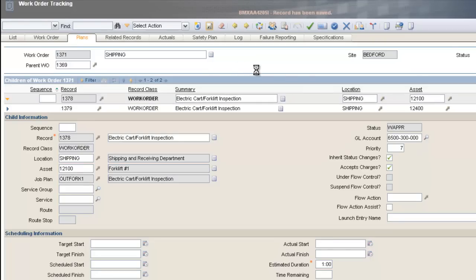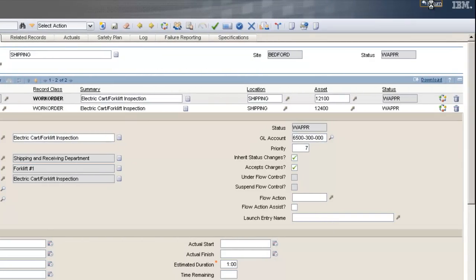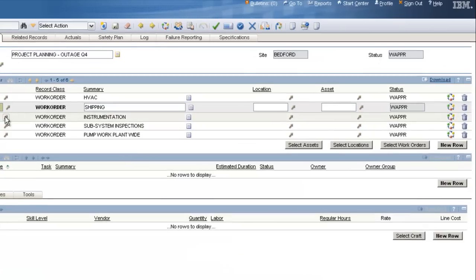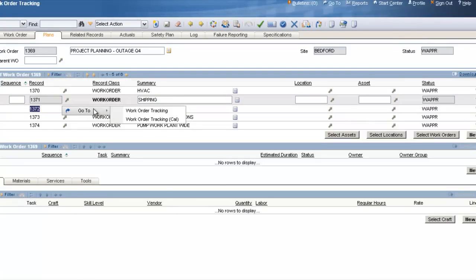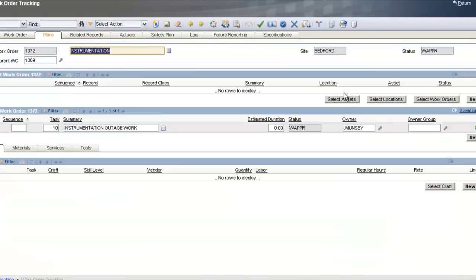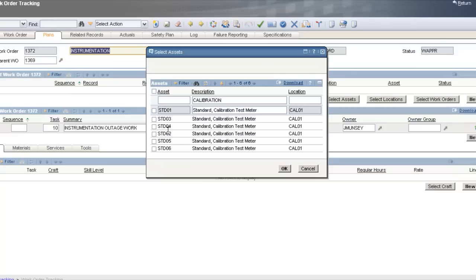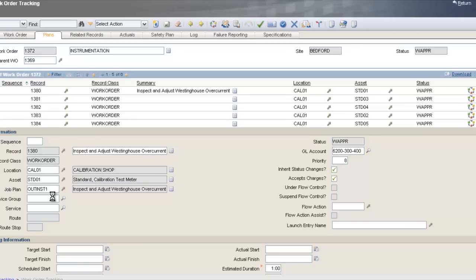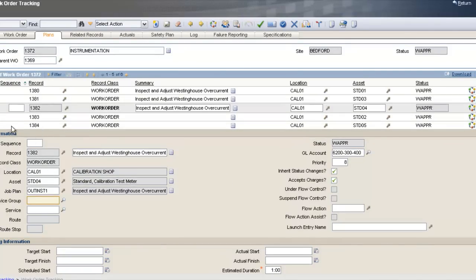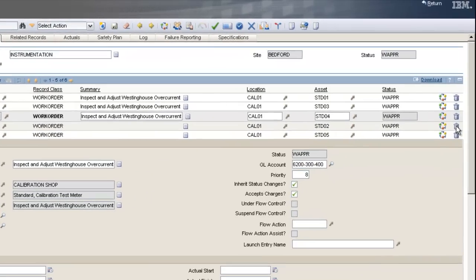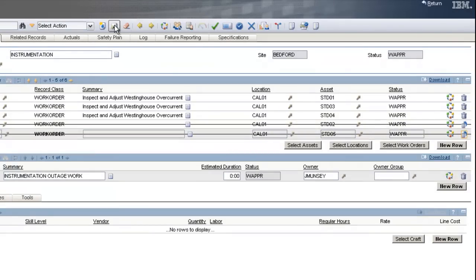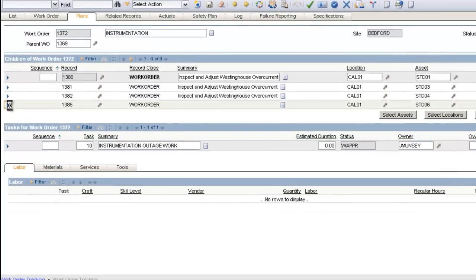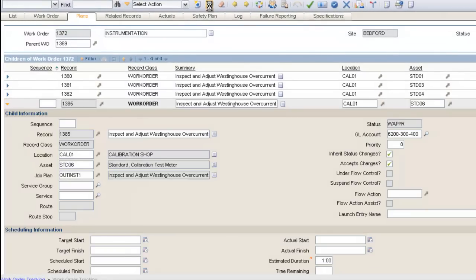Keeping this simple for demonstration purposes, I'll go back to the original project plan and become the instrumentation department head. Click the arrow, go to Work Order Tracking, go to the Plans tab, and select assets. Filtering for instrumentation standards — they all need to be recertified. Clicking OK creates six work orders for the instrumentation group. Each one needs a job plan, so we'll add them. If I decide I don't want the last two, I can click the trash can to remove them. Save, and the instrumentation department is ready.